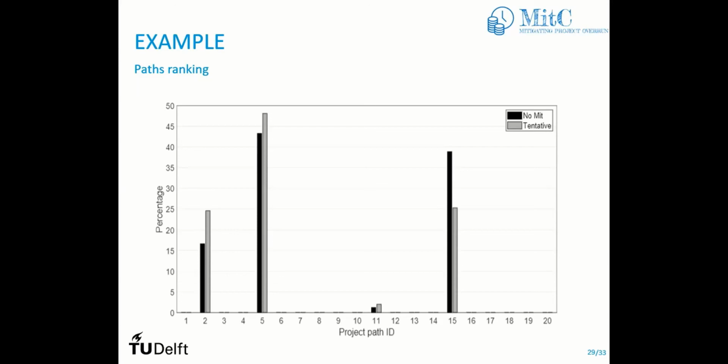In one iteration an activity takes 100 days, in another iteration 95, because there is uncertainty. And changing the duration of activities can affect the critical path, because in some iterations one path can be the critical path, but in other iterations another path can be the critical path because durations are changing. So you cannot really expect which one of them is the critical one.